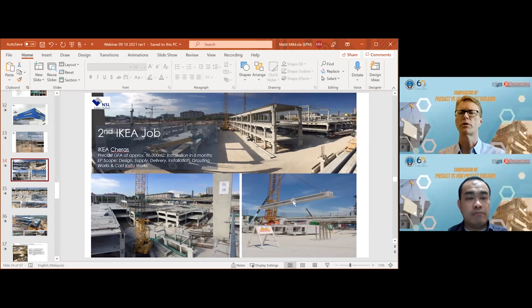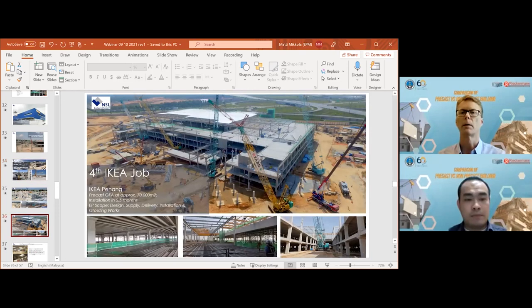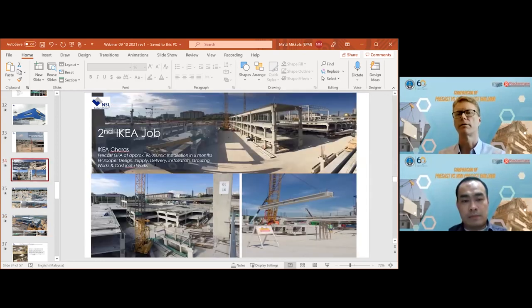Nevertheless, all pre-stressed components, whether it's a long beam like this or hollow core slab or any pre-stressed product, must only be lifted from the ends. As you can see here, there's a lifting loop at the very end. Similarly, the hollow core slabs also are lifted from the ends, and they also need to be stored from the ends. So it's an important thing to remember. It cannot be supported from the center because it has no bending capacity in the negative direction, in the vertical direction from the center. It has to be supported from the ends.